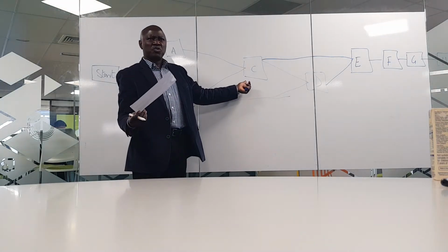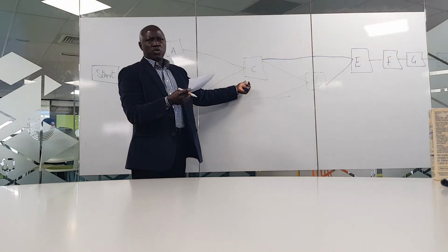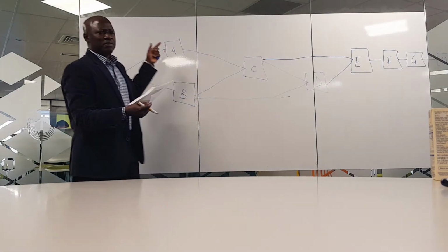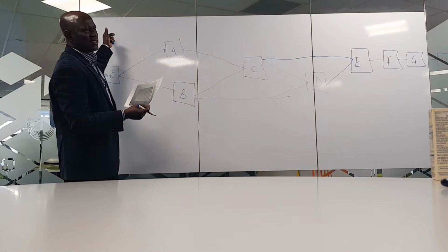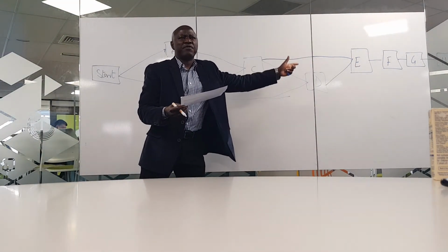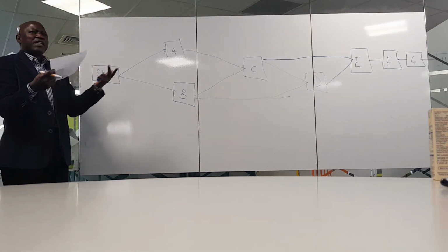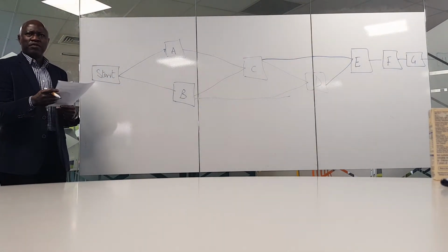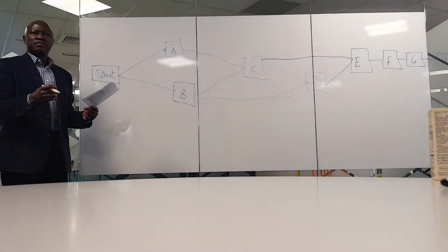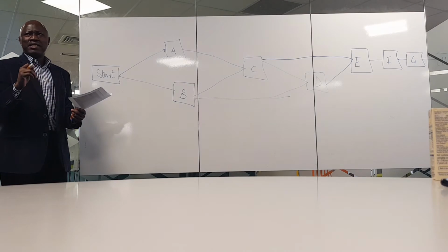The next we are going to do is going to be, we are going to assign days to it. And we're going to work from early start to early finish. We're going to work backward from late finish to late start. That will give you a graphical representation of float time and critical time. Am I making sense? Yes.